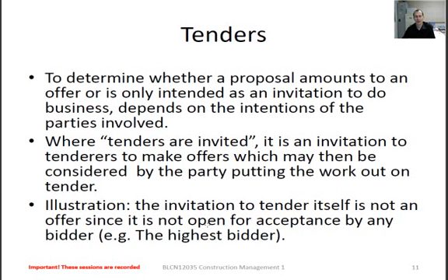If it is an invited tender, it becomes a little bit more messy, because now we have only a smaller number of people or contractors that's going to take part in our bidding, and therefore we need to be clear as to how the allocation or agreement process is going to work. If we leave ourselves open there, we might find that we have to go for the lowest bidder or the highest bidder, depending on if we're selling or if we're building. Alright, so always make sure that you follow that last little point there. Invitation to tender is not itself an offer, since it's not open for acceptance by any bidder. Alright, so remember that one there.